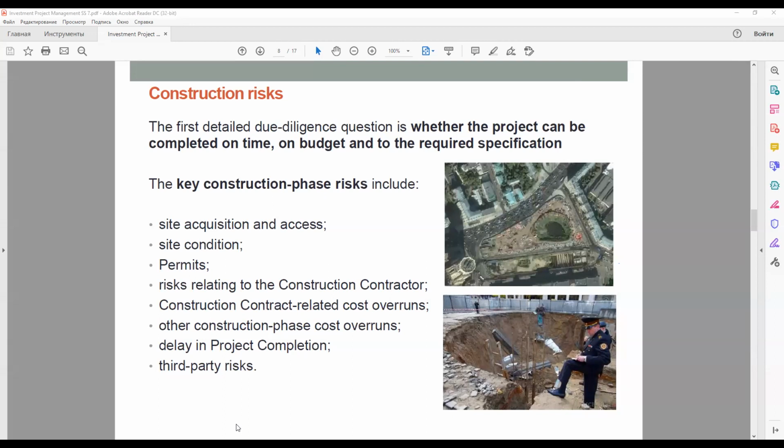If such problems are unexpected and therefore have not been dealt with in the project contracts, the main mitigation from the lender's point of view is that a risk of this nature should be apparent at an early stage of construction, when the project costs have probably not yet exceeded the amount of the equity investment, and therefore they can stop advancing funds if any major issues of this type arise, with their risk covered by the equity.